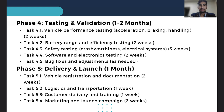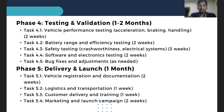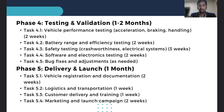The fourth phase is testing and validation, lasting one to two months. The vehicle is tested to ensure it performs seamlessly, covering areas from performance estimation and handling to battery range and software functionality. Any bugs or issues are addressed here before moving forward.